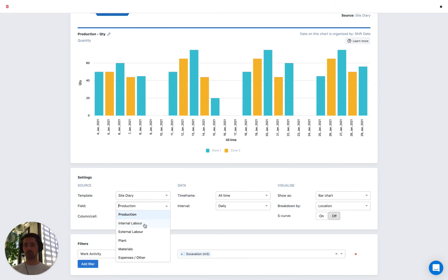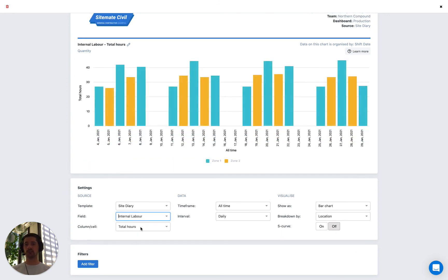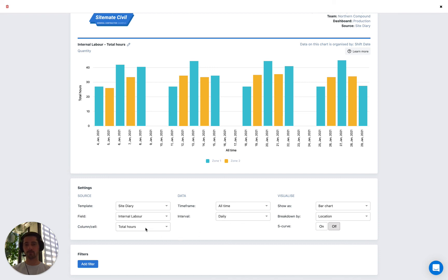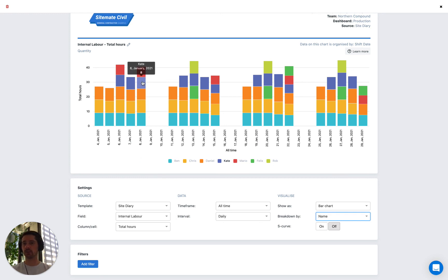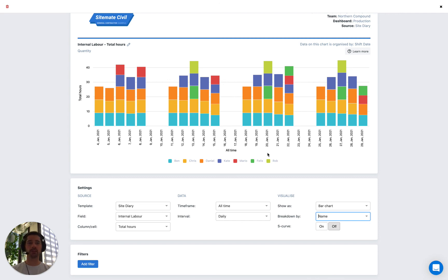Looking at tracking labour, by default it has selected total hours, which is great. Our breakdown is already turned on. Let's keep the time frame and interval the same and visualize this as a bar chart. In terms of the breakdown, we might want to break it down by the person's name. The different colours represent different people, and we can hover on each block to see the quantity for that person. From the legend, we can see week by week who's working on what days and how long they worked — that information over time.